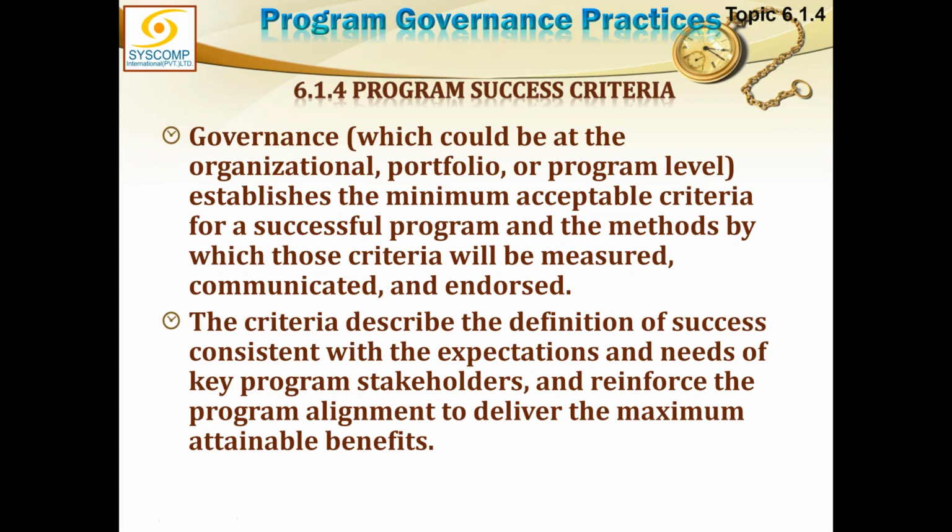So we define the minimum level of success, but there is a kind of play in it. We can have a tolerance, and say that success starts from here, and it may go till here. So any level in between is acceptable. The minimum level must be achieved.